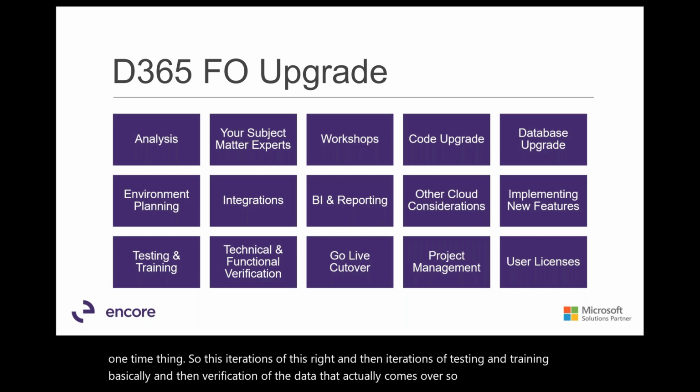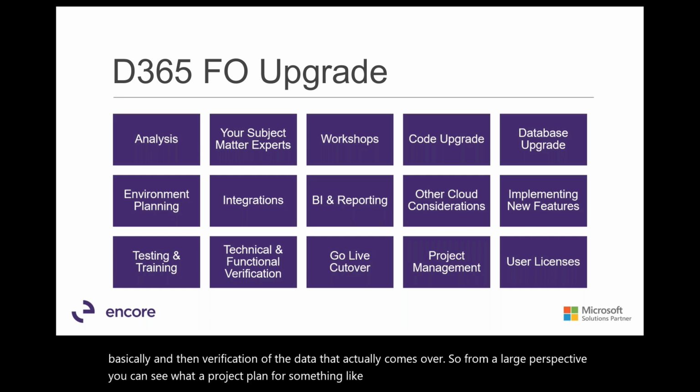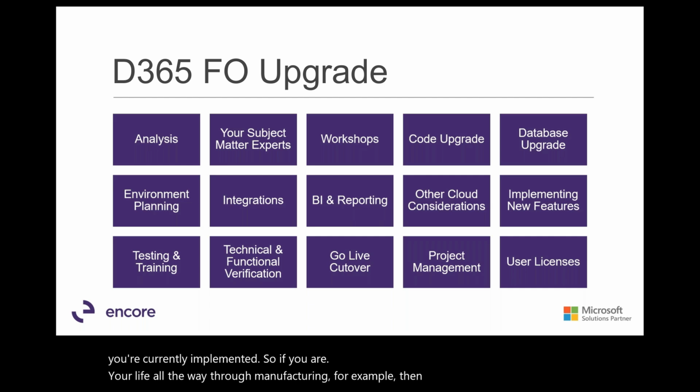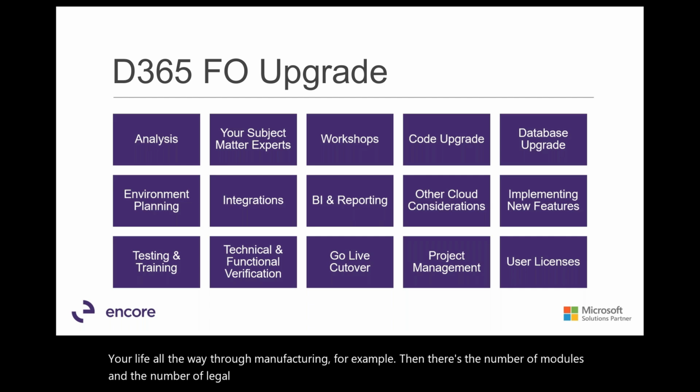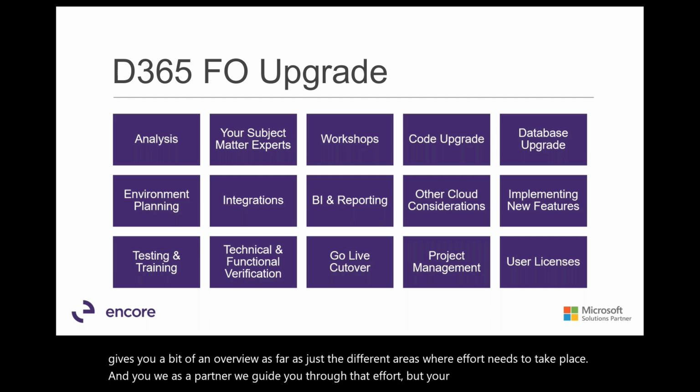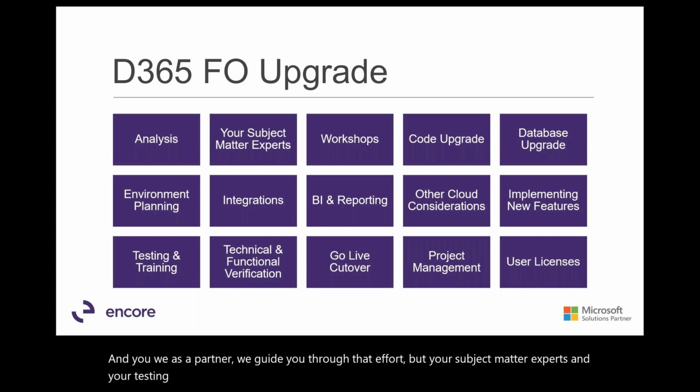From a large perspective, you can see what a project plan for something like this might look like, and however deep you're currently implemented. If you're live all the way through manufacturing, for example, then the number of modules and the number of legal entities will drive your effort with this. I hope this gives you a bit of an overview of the different areas where effort needs to take place. We as a partner guide you through that effort, but your subject matter experts and your testing are going to be instrumental.